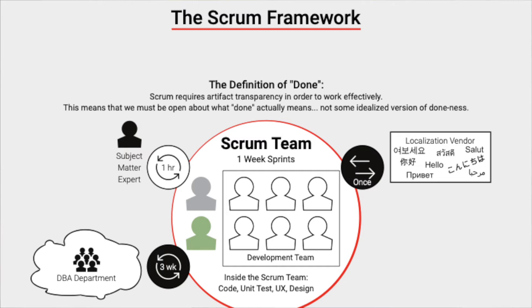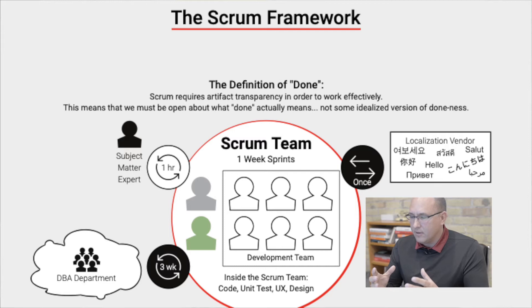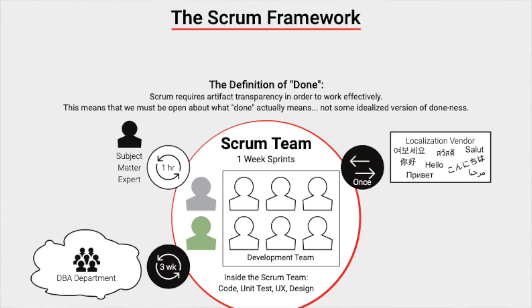Let's look at another problem situation. Often when doing software development in Canada, we have to localize into French for regulatory reasons, and international products may need many languages — this is called localization. Most organizations outsource that to a localization vendor. A Scrum team might not be able to do that every sprint; instead, they might do it in a big batch — sending all the localization content to the vendor at once and getting it returned once. This is clearly a problem because the team won't have potentially releasable increments without that localization work.